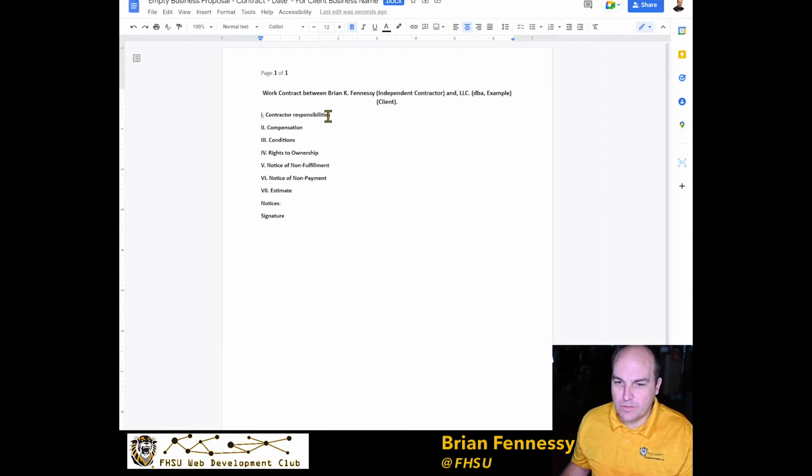Next is the contractor responsibilities. This would be what you're committing to. So for instance, I commit to 30 or 40 hours per week of working on your website, or in this case you'd put client name, website.